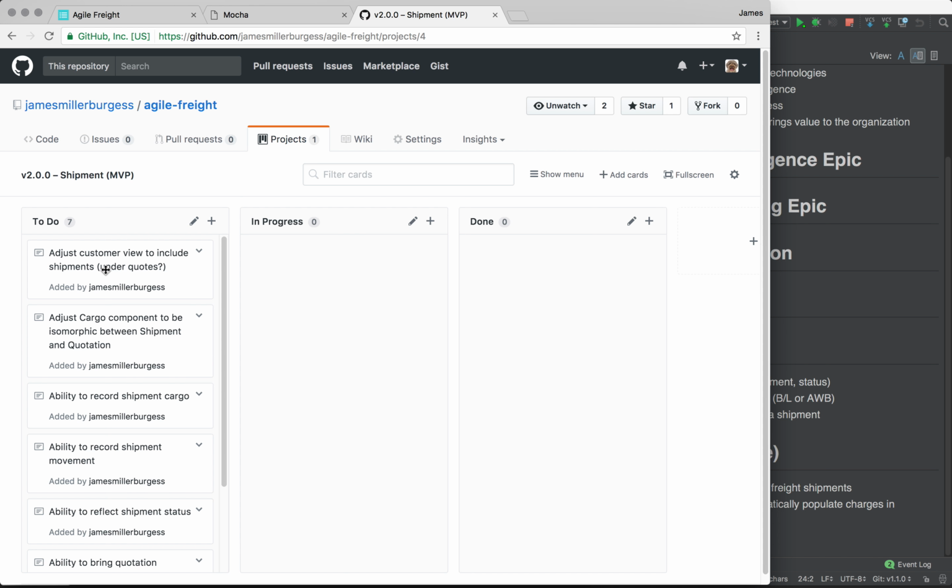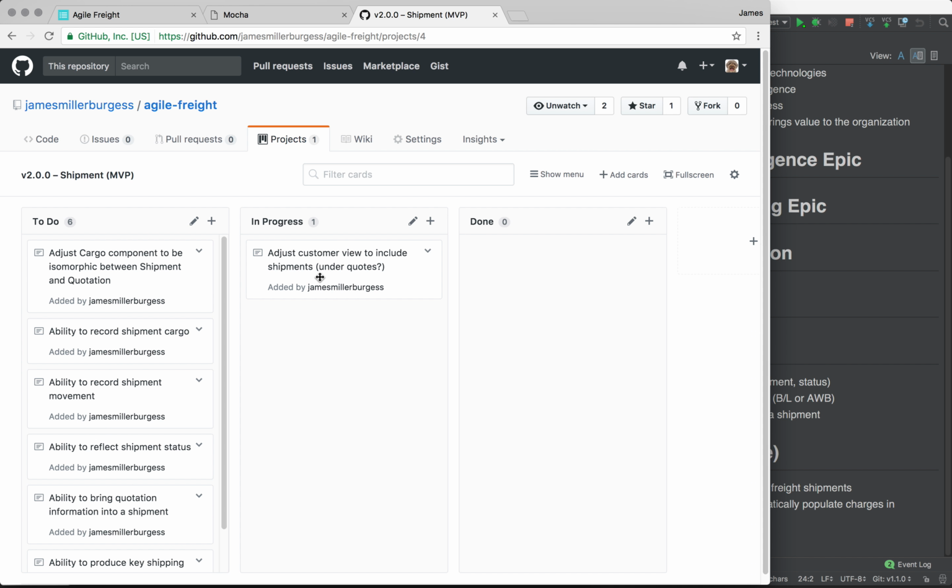I'm going to say I'm pretty sure I can complete this in a sprint. Of course, I don't know all the requirements. I don't know exactly how I'm going to do it, but I think that I can do it, which is fine. During sprint planning, I can take in and push out as I learn more about what's necessary. Right? We can also split the cards and say, well, do this part first and do this other part later. It's all very flexible, but the key is to have an amount that the development team is comfortable with completing in their sprint time frame. Okay.